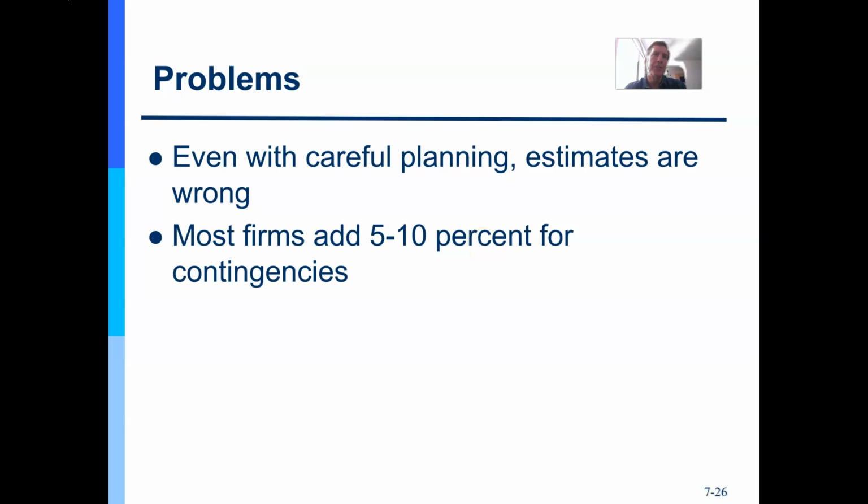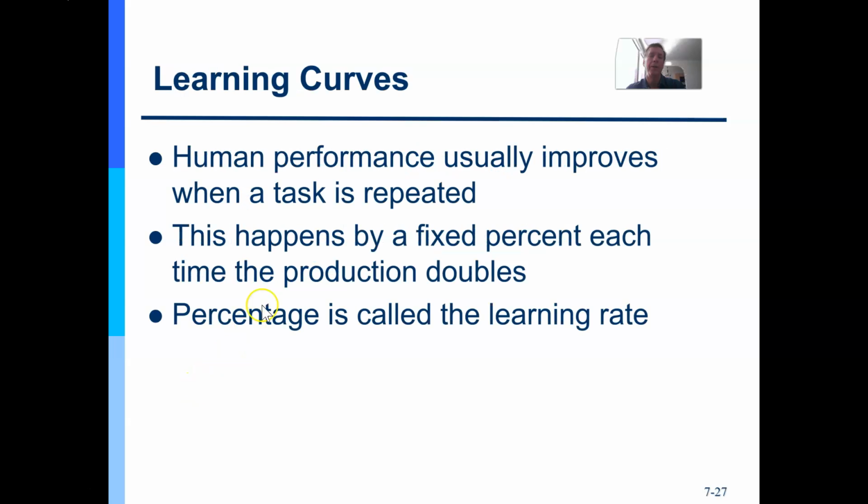Now, I would say most firms add 5 to 10% for management reserves. For contingencies, that's something you, the project manager, will have to work through. If you don't have any high-level risks with a large impact and a large probability, you may have none along the way. And so there are learning curves to consider also in your estimate. We don't just walk out the door knowing everything, but we'll make fewer mistakes over time, and that's a learning curve. We want to accommodate that in our budget.